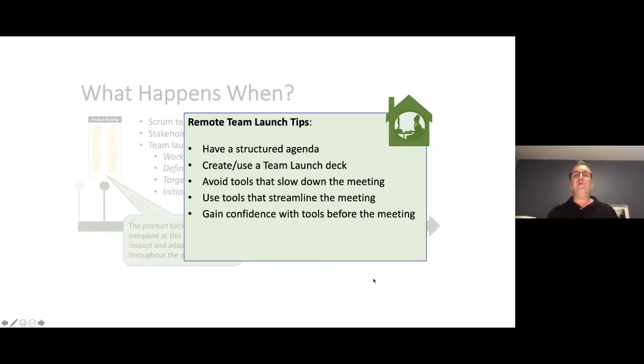And a few tips for you from a remote team launch standpoint. If you're working with a new team building a new product, try to introduce as much structure as you can into the backlog development day. Even create a launch deck so that you have a consistent process to make sure we don't forget to include definition of done, working agreements, understanding of vision and scope, and the stakeholder requirements that are brought into the meeting. Also gain confidence with the tools before the meeting so you're not learning the tool on the fly. I can't tell you how many virtual meetings I've been on where we throw up Microsoft Whiteboard and we spend half the meeting teaching people how to use the tool. So try to get all the learning out of the way beforehand.